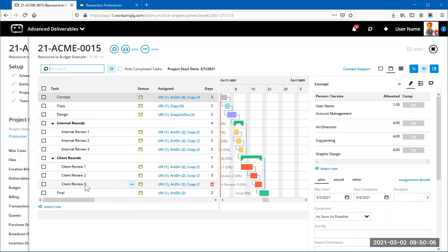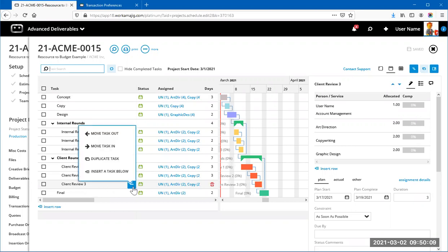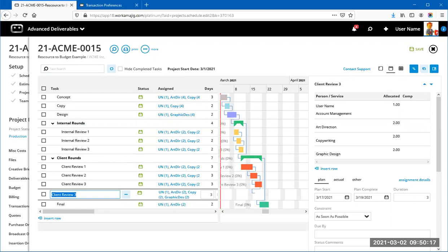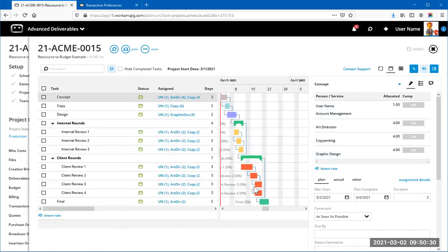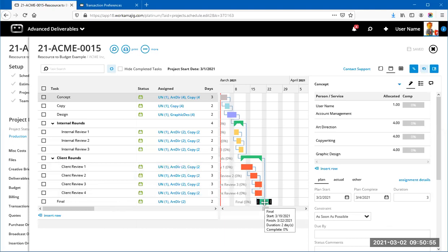Adding an extra round pushes out subsequent tasks because this last task's predecessor is the client rounds summary task. So you can add rounds ad hoc as needed and they fit into the schedule. Of course, adding a new task also adds allocated hours, so before starting round four, you'd jump to Estimates and create a change order estimate, auto-pulling the changes from the schedule.